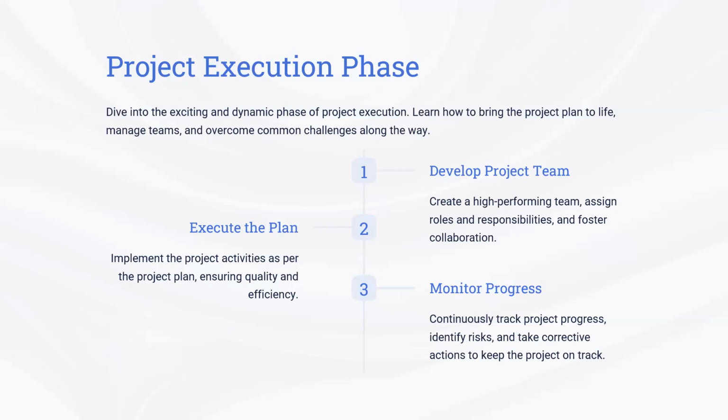So though we have this contract administration team to monitor the progress of the team, even the project team has the responsibility of the same. So continuously tracking the project's progress. This can be done very easily if the whole project is broken into small projects.